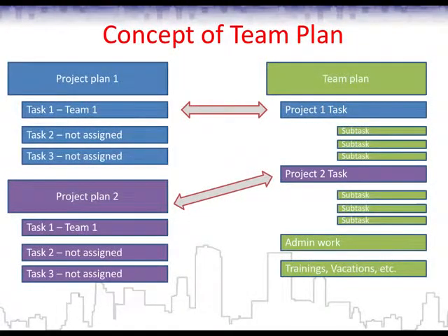I think the information about updates in the project plan should be visible in the team plan, but the team lead, being a manager of his own plan, should make his own decisions. Once an update from the project plan comes, like the project manager moved a certain task 1 week later, then the team manager should decide whether he can move the project task in his plan by 1 week or maybe 2 weeks later because of the other activities. Or maybe he should call the project manager and insist on returning this task's time frame to its original position.